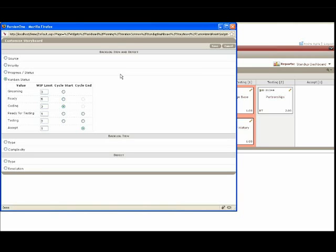The big thing here — with the ability to pivot the storyboard by any customer's type — is that if you're running a big enterprise with multiple concurrent teams, you can have different pipelines and also run a Kanban or pull system pilot project, which is a popular way to go. Just feel it out, see if it's right, test the waters, then slowly convert people over. In lean thinking, most products will prescribe the process — rather than one process that fits all, we might need a slightly tweaked process per product. A product will dictate what it needs in terms of work and operational definitions. You have a node in your project tree in Version 1 Enterprise, and you can have a specific pipeline for that node.